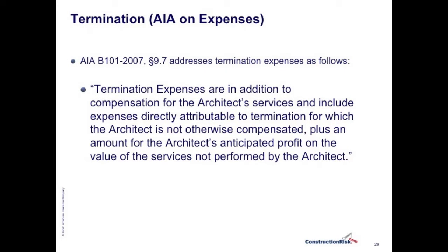And at Article 9.7 of the B101 form, the AIA states the following, quote, "Termination expenses are in addition to compensation for the architect's services, and include expenses directly attributable to termination for which the architect is not otherwise compensated, plus an amount for the architect's anticipated profit on the value of the services not performed by the architect."